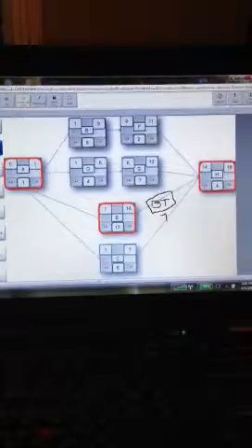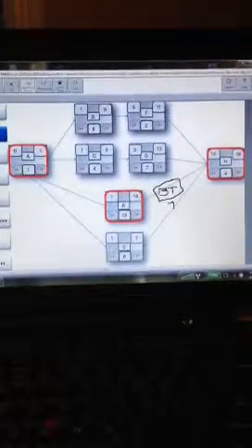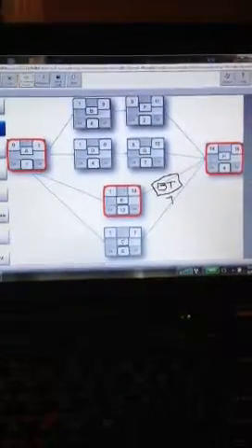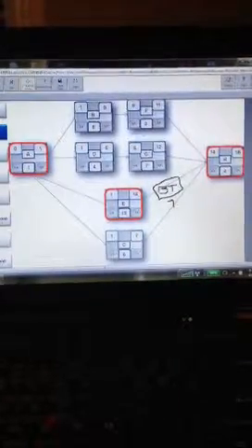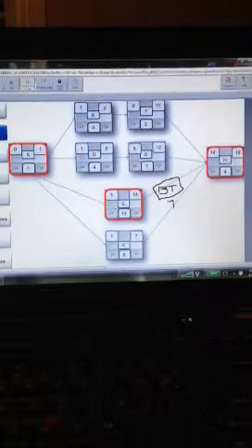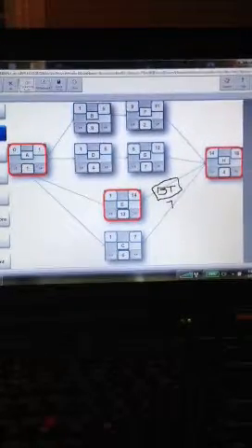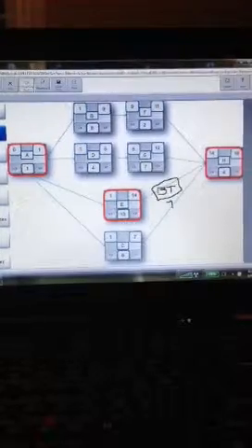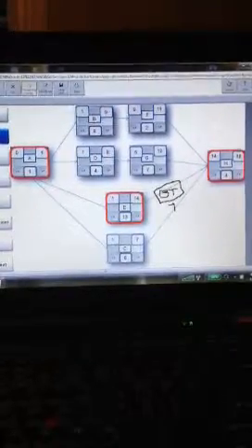We've got to add 7 days to the actual critical path. So if we're just working with days here, what would the critical path be now if we employed critical chain? Just doing simple math, it's 18 now, but we need to add 7 days, an increase by 7. Exactly. 25.